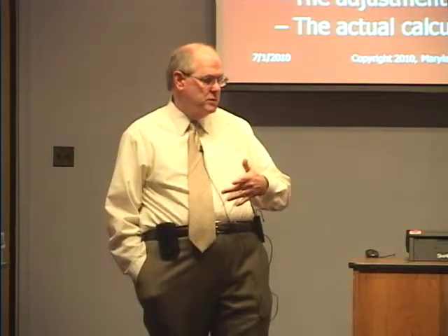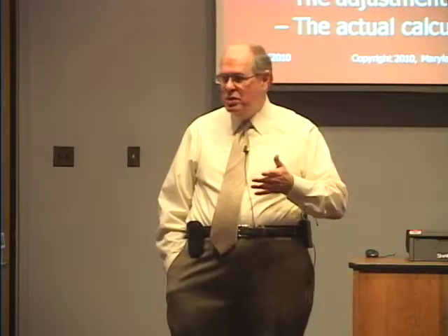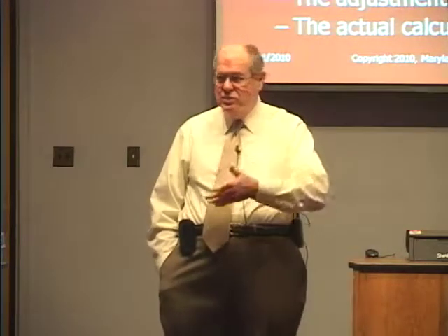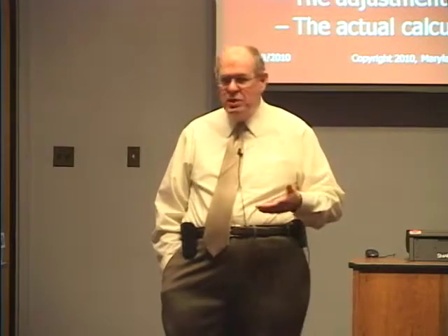That supposedly because there was some variation in the number of meals being served, the vendor submitted a higher bill for the meals. And the agency in question just accepted the invoice from the vendor that they were entitled to an adjustment because of this variation in the number of meals. And we looked at the contract and we said the contract has a CPI adjustment factor, but nothing in there relative to a change in the number of meals being served. So the answer is no. The vendor is not entitled to an adjustment for the circumstance in which you submitted it.